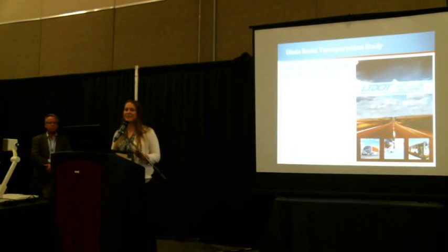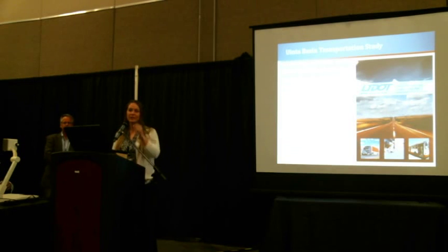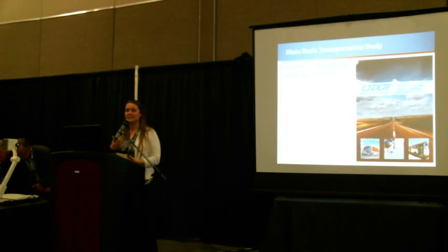So for this, because the Uinta Basin Transportation Plan was so well developed, we were able to take a lot of the needs assessment, the well-defined needs assessment for all of the projects, and essentially integrate those projects that have been defined through this study, along with the information relative to the timing and all of the project details that have been specified, and more detailed cost estimates that were more refined than what we're usually able to produce for the long-range plan. And we were able to just bring that right into the long-range plan.